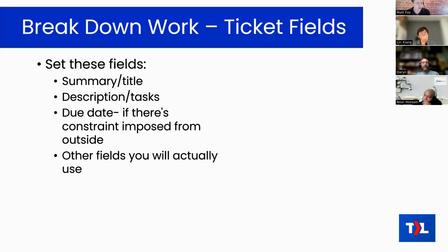Or like our MSP, we do a lot of work for schools, right? So there's certain things that have to be done in the school break period, because once school starts, you can't do that work anymore. So that would be a good reason to use the due date. Then that does help you identify that work that needs to be done by a certain date. Otherwise, you get really embarrassed. If you can just reset that, push back that due date, then it's probably not a real due date.